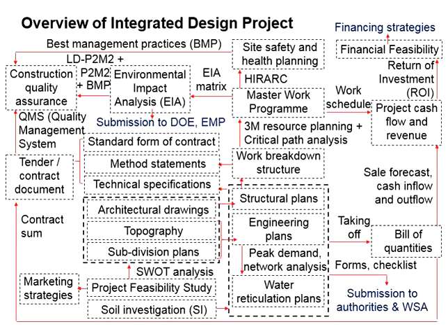Depending on the amount of resources put into the project, the durations to complete certain tasks may differ from the intended amount given in the drawings. Based on the work breakdown structure, you need to consider the sequencing of various construction activities in accomplishing the construction project.